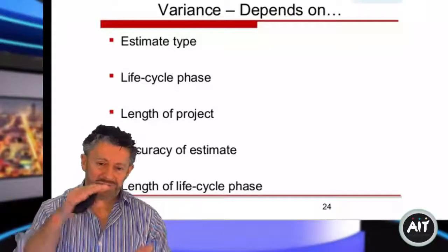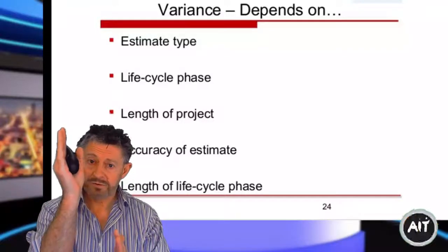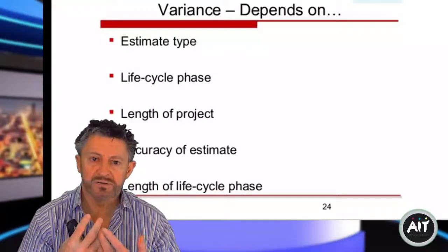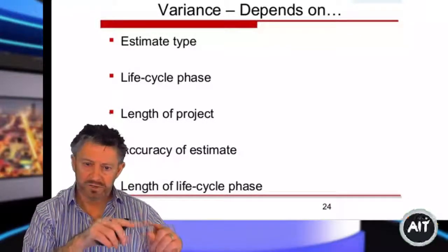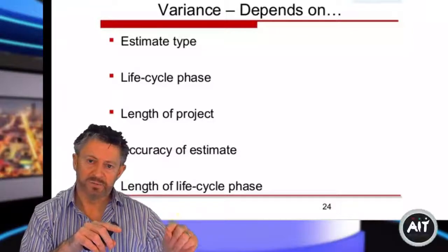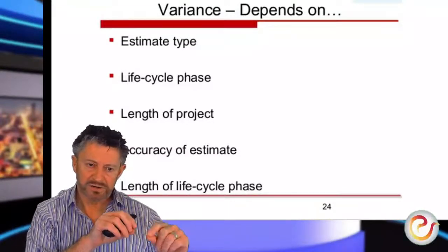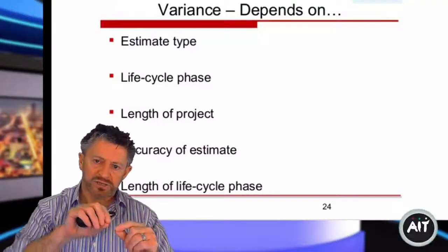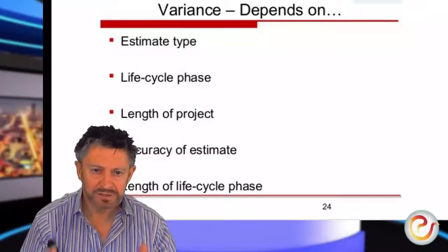Okay, so the execution might be the longest phase, even though on the graph it'll look very short, but it can be long because there's so many activities going on. The reason why it looks so long at the start is because there's so few activities. It's all planning and it's only a few people, and therefore your costs are slowly going up. When you get into the execution, they start to go up rapidly, but there's a lot more things happening in that period of time.